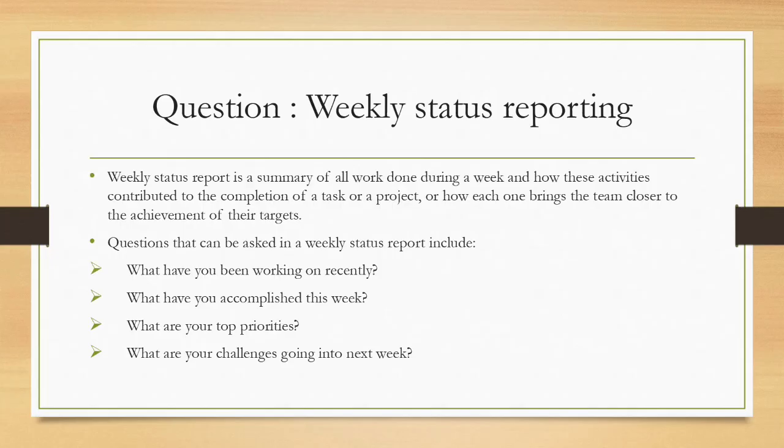And the weekly status reporting. In the weekly status report, whatever work you have done throughout the week, the activities you have contributed to this project and organization, you will be entering in this report. The questions that can be asked in the weekly status report are: what you have been working on recently, what you have accomplished this week, what your top priorities are, and what your challenges are going into next week. These are the things we will be mentioning in the weekly status report.